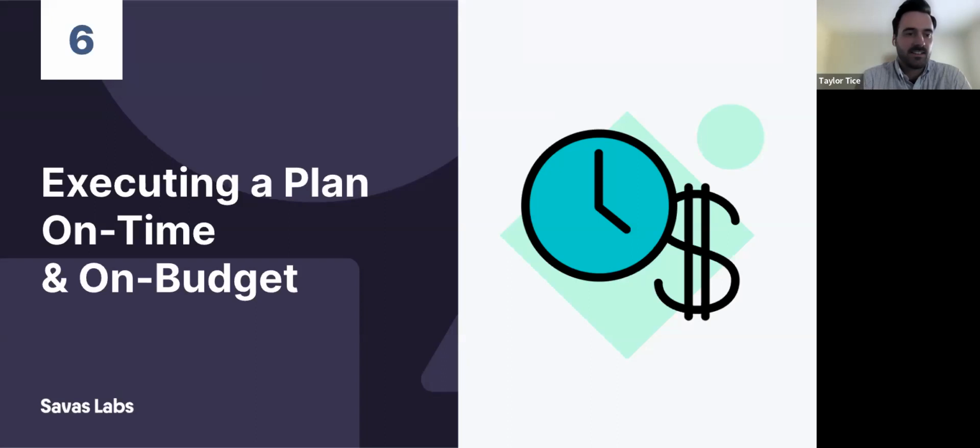Yeah, so Maddie teed that up nicely, and recognize that it sounds cliche, but it's cliche because it's true. It's great communication. At Sabas, we meet on a weekly basis internally to assess our progress, troubleshoot issues, and identify any potential blockers that could be on the horizon that could derail our project plan in any way. Then once we have those conversations internally, we're coming to Maurice and his team and having those exact same conversations with him. Again, inviting them in, being good partners, really getting down in the trenches with them to continue problem solving throughout the course of development.